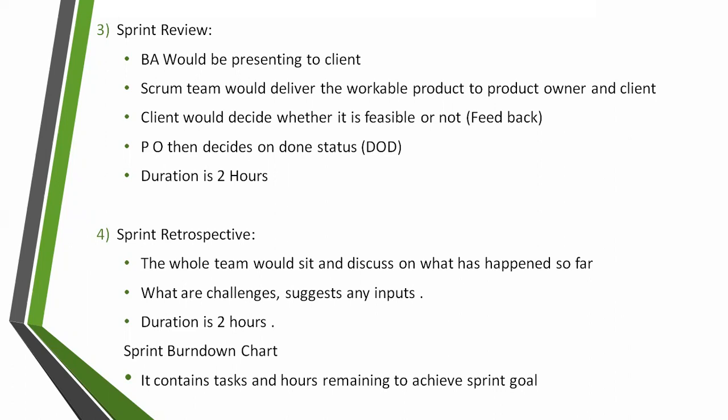After the sprint review meeting itself, no matter whether the client has given negative feedback or positive feedback, we need to follow this event. You need to get the clarity that no matter whether during the sprint review the client has given positive feedback or negative feedback, in other words, go ahead or make some changes, irrespective of that, we are going to have a retrospection.